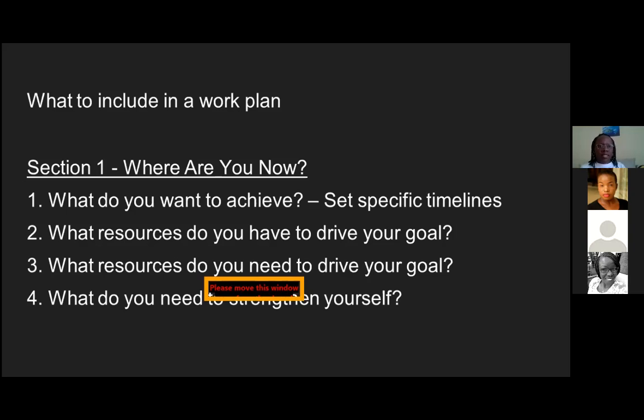Because if you do not understand or if you don't answer all those questions, you might find that you will invest in something that you didn't require in January, yet it was required in December. And I'll give you an example because I've been a victim of that. One time I had this really big ambitious goal of just this platform. And then because I had not done a process like this, I went and paid 500,000 shillings to put up a website. An e-commerce platform.